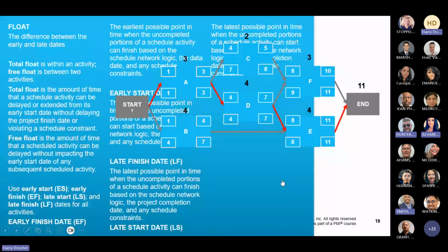They don't have it on the test anymore. But when I took the test, they would just give us a list of tasks, durations, and dependencies. And we'd have to construct the diagram, go through, determine the critical path, and do a forward pass like that, do a backwards pass to determine the amount of float in each of the paths.